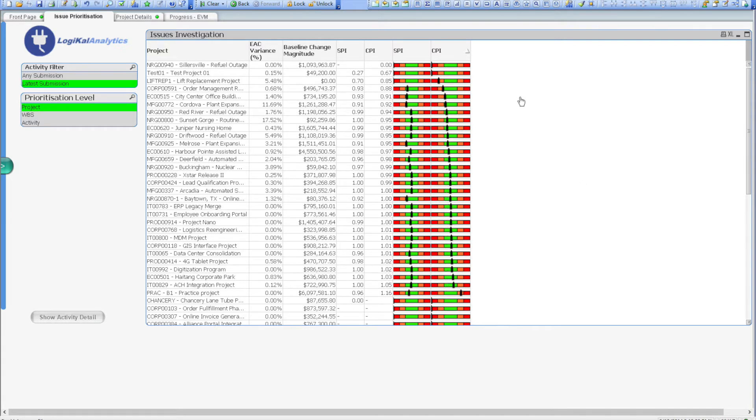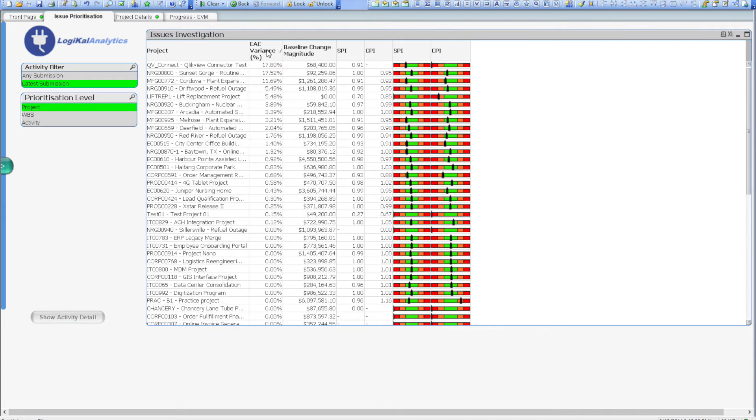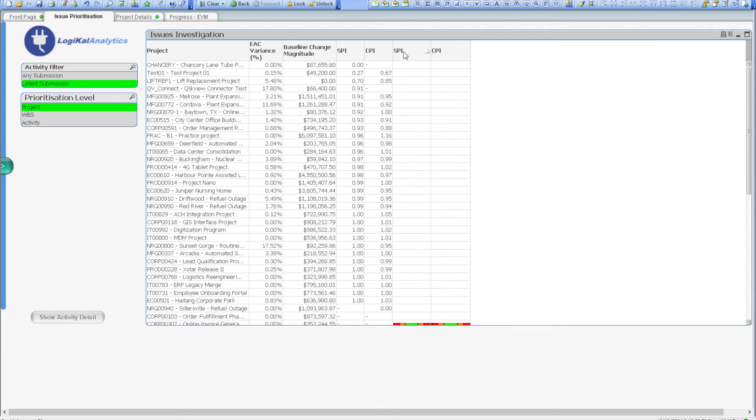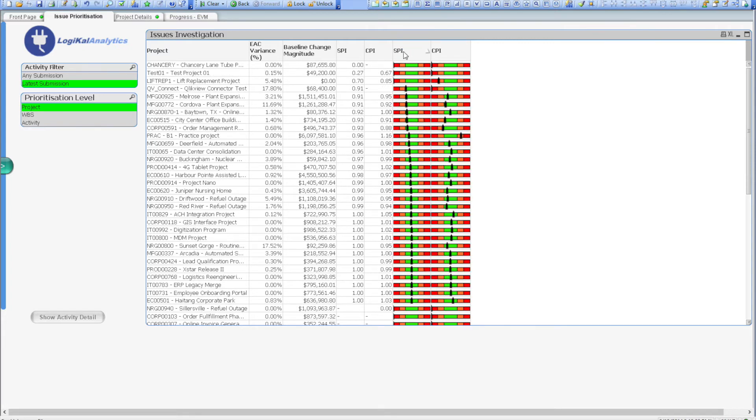Alternatively, you could also use the EAC Variance Percent column to determine how far over the baseline value I'm predicting my projects will run. For our organization, I'm more concerned about on-time delivery, so let's take a look at schedule slippages using SPI analysis. I can see that the majority of projects fit within the accepted boundaries of performance, and we don't need to concentrate on those at all.